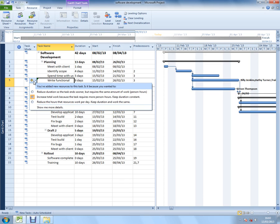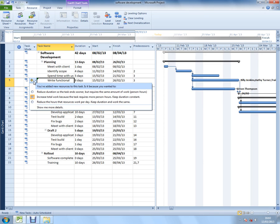but I've added more work resources to it, my default is to increase the total work on the task, which makes sense. So most people are probably quite happy with that, but it's given us a warning to check our effort-driven scheduling and task-type settings to see if it's okay with us, project-wide or task-wide. And it's given me the ability right now to change these on the fly as well.